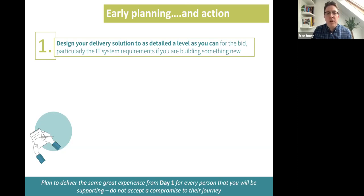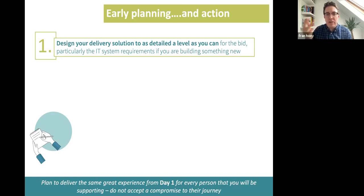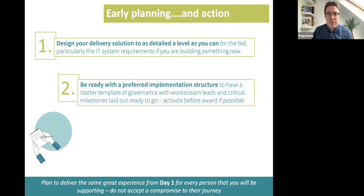In terms of early planning recommendations: first, design your delivery solution to as detailed a level as you can. For the bid process, if you can really invest time in nailing down the detailed handoffs, the processes, usage of the IT system and its requirements, do that as much as possible during the bid. You don't want to take a flyer on that detail and then realize something doesn't work. Areas that tend to be left too late include employer services handoffs, IT system requirements, business reporting requirements — these should be covered early on.